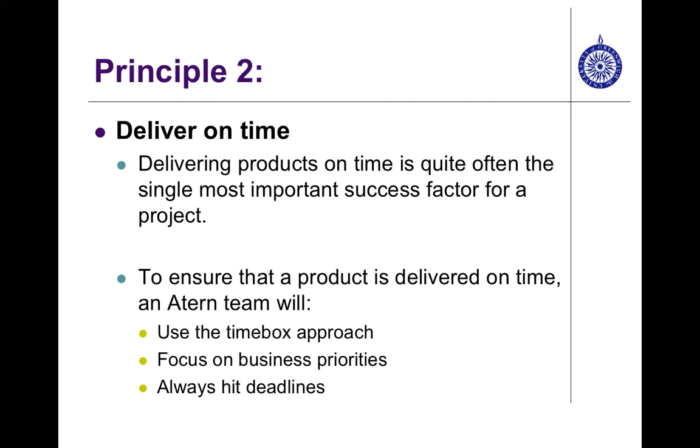In the last section, we learned about the structure of one time box. Remember, three main sections. The first is kick off, the last is close down, and the middle is three different activities: design, implementation, testing.